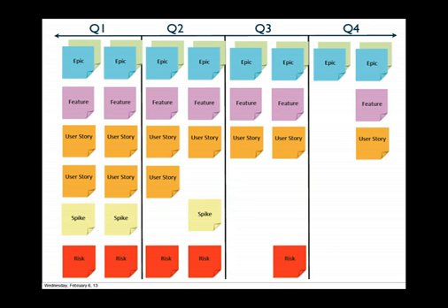And I think this is a huge thing that we need to start talking about. At the enterprise level, estimating is a part of it. We need to know if it's bigger than a bread box or if it's an extra large or what have you. But at the point that we put a number on it and we've allocated capacity to it and we expect there to be an ROI associated with it, that is now our budget.